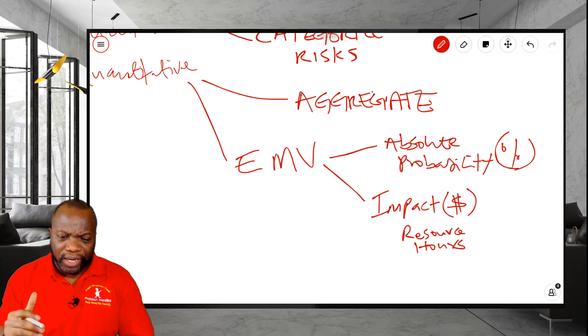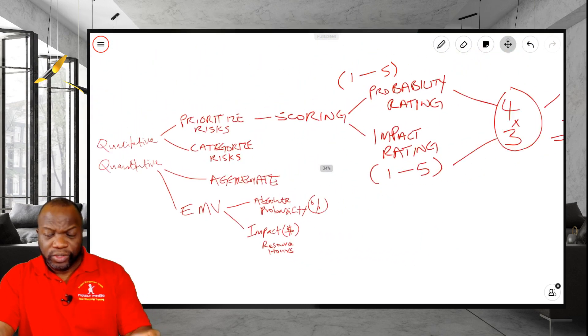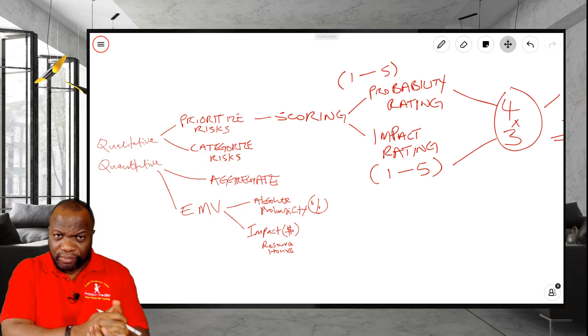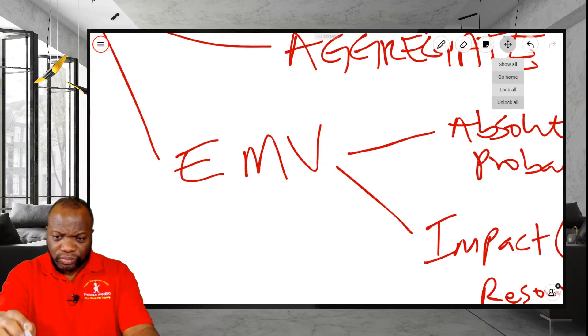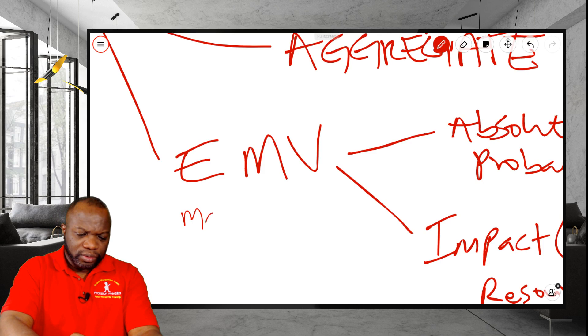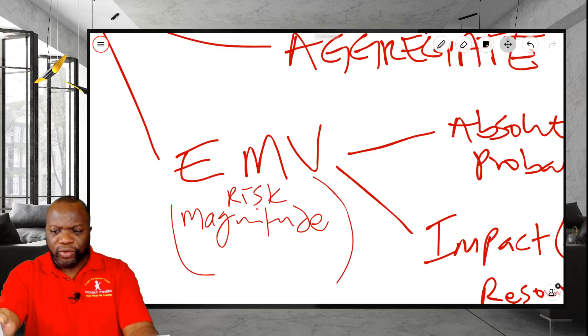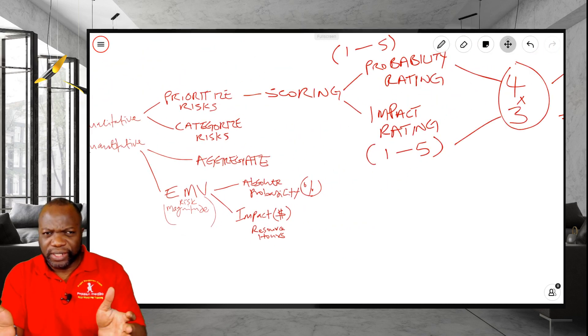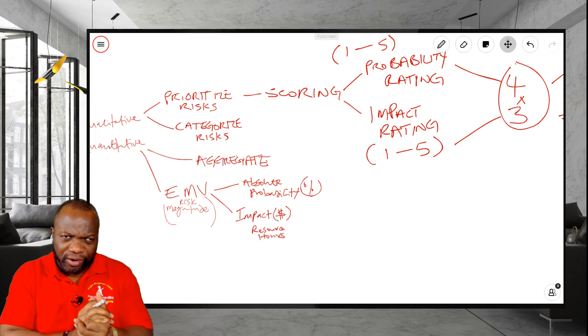This is the major distinguishing factor between a risk score, which is just some numbers on a scale, versus EMV, expected monetary value, which we also refer to as a risk magnitude. However you want to spin it, it's very clear there's a difference between numbers on a scale, versus an absolute dollar amount, or an absolute resource hour amount, or absolute probability combined with it.